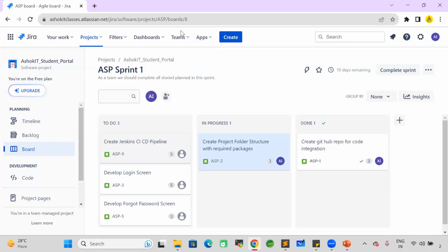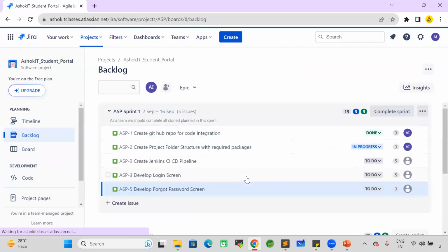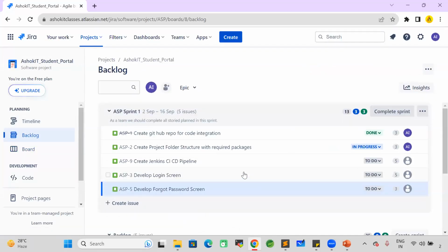What is Jira and why we are going for Jira? In the company, they will provide you credentials to log in into the company Jira account. Projects will be available. In the company, you are responsible to create the stories in the backlog. Okay, so you can create the stories in the backlog. You can give the story points also. And Scrum Master will do the sprint planning, will prioritize the stories to complete. Once a sprint is started, you can assign the story to your name from the dashboard, which are in the to-do status, and you can start working on that.